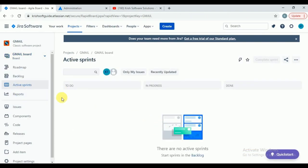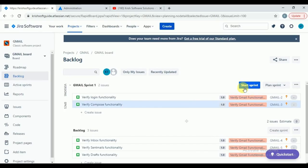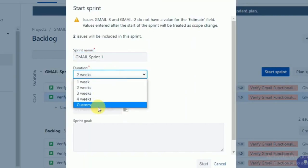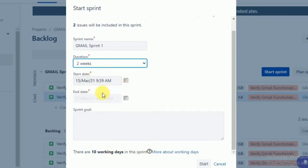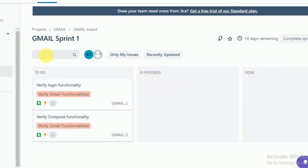To see user stories in the sprint board you need to start the sprint. Go to the backlog — we have only created the sprint and not yet started it. Once you start the sprint, you can see it in the sprint board. These two user stories are moved to Sprint 1. Now I am going to start the sprint. It will ask you two weeks, three weeks, four weeks, or custom — most of the times it will be two weeks.